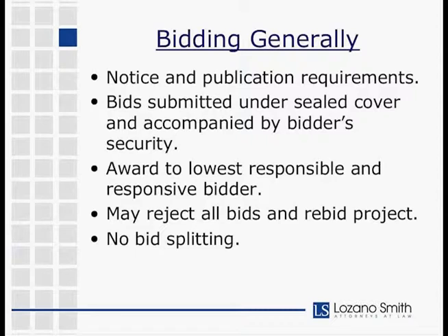If a bid is rejected as non-responsive, there's no hearing required. The school district just notifies the bidder and gives them an opportunity to respond. So in other words, advise the bidder, hey, we received your bid, however, you neglected to include licensing information on page 3, therefore this is non-responsive, cannot be accepted. And then you're done, and then the district can award to the second lowest bidder.